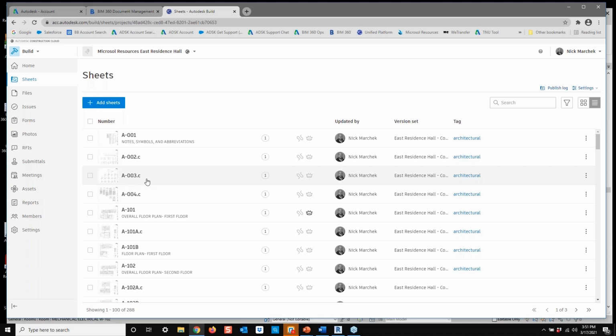Sheets are one of the main components of the PlanGrid tool that was integrated into this unified platform. The major benefit of turning your documents into Sheets for use in the field is that the sheet numbers will automatically be detected as you add revisions and bulletins, those types of things, and keep everything in proper order. Slip sheeting can be an interesting process for project organization. So by using the Sheets and having that information automatically update for you, you will know that the people on the team have access to the most recent drawing files through the app on the site.